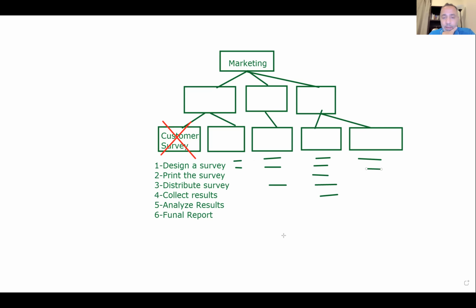In the software, like Microsoft Project, they use the term task, but the proper term is activity. Sometimes in some literature they use task, activity, and work package with the same meaning, but the proper term according to the PMI is activities. They are not even assignments, because we haven't assigned any of these activities to any of the team. We are only now identifying activities. So they are not tasks.